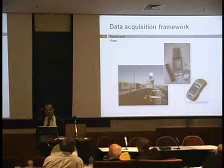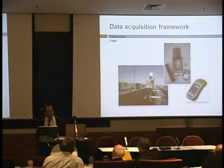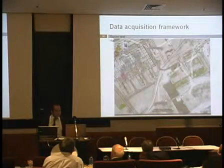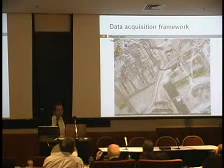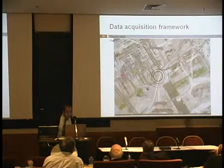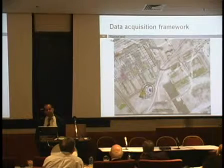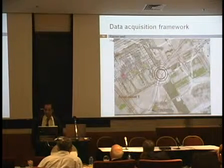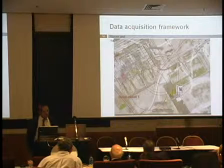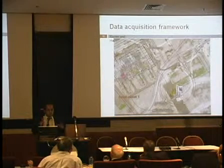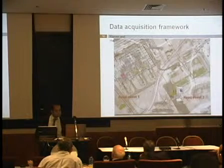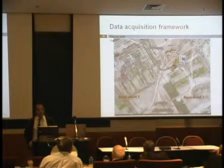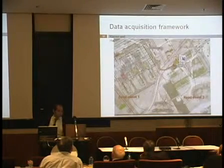They use GPS identification, RFID technology, and a built kit that can be put in a pocket or worn as a watch. This slide shows the motivating scenario, where an RFID reader and GPS can be moved around the site by individuals who are walking around or driving. These RFID readers can read the tags of the components and the GPS logs positions, and based on them, some techniques like triangulation can be used to estimate the location of materials.